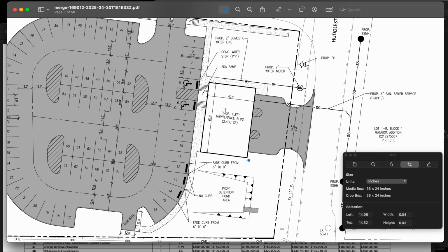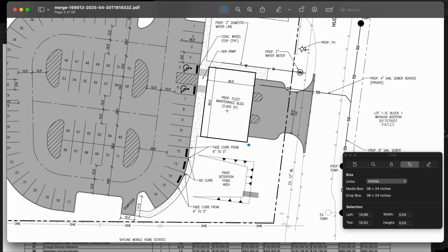Now, for this building, you have 20 loads of export. I just want you to put that in the back of your mind. Do not include the export in this bid right now. You're not going to make money if you just charge the export of the soil, because the dirt has to go into the trucks as you're exporting it, and then you'd have to factor in the cost of you loading the trucks, and then it's a hassle. Do not do it that way.